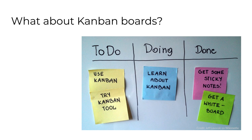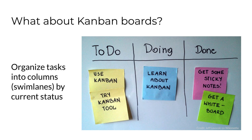You should also know what a Kanban board is — another technique more commonly used with agile methods. In the simple example shown, there are three columns or swim lanes drawn on a whiteboard that designate the status of tasks. Each task appears on an individual sticky note placed in a swim lane. The owner of the task updates the board by moving the sticky note to a different swim lane, so anybody who looks at the board can see a task's current status. Kanban boards are used in daily stand-ups, where team members gather for just a few minutes at the beginning of each workday to discuss the project and provide updates.